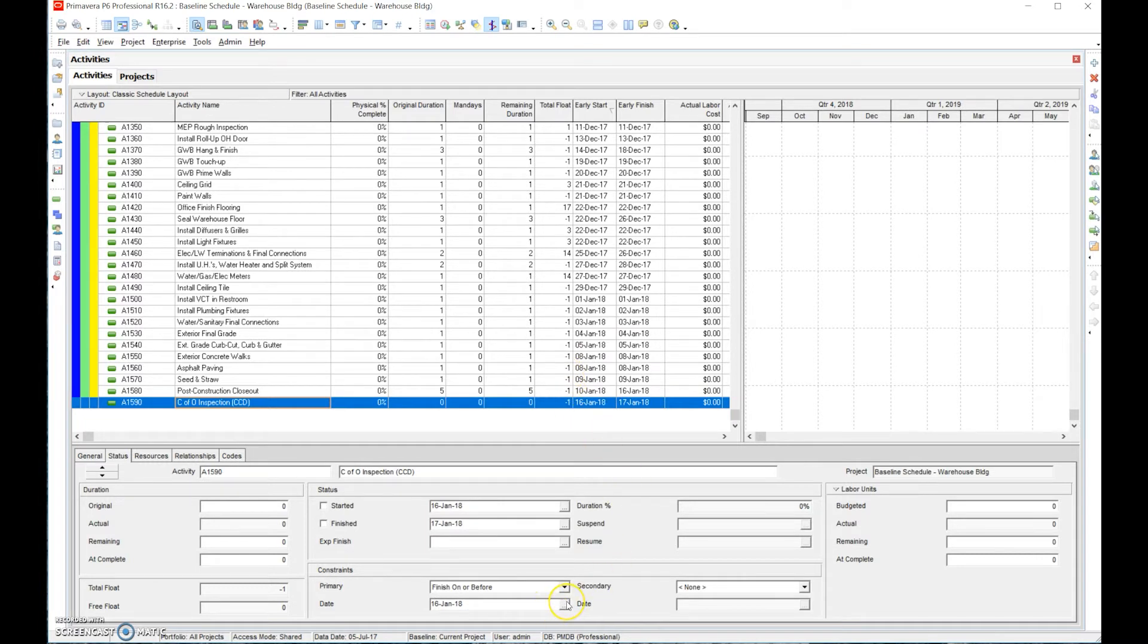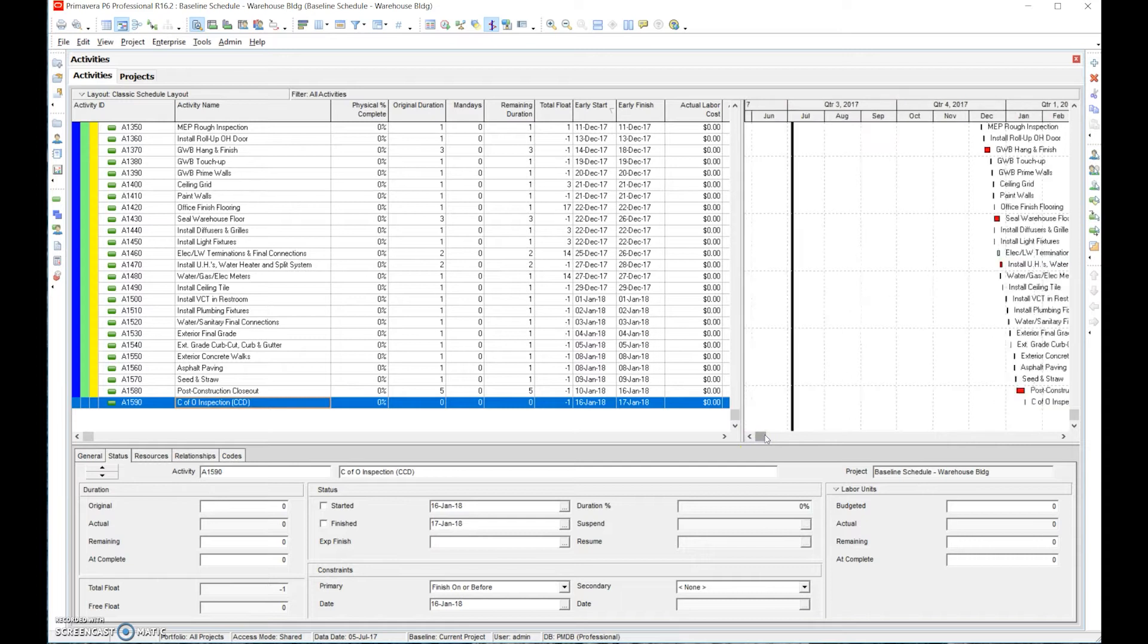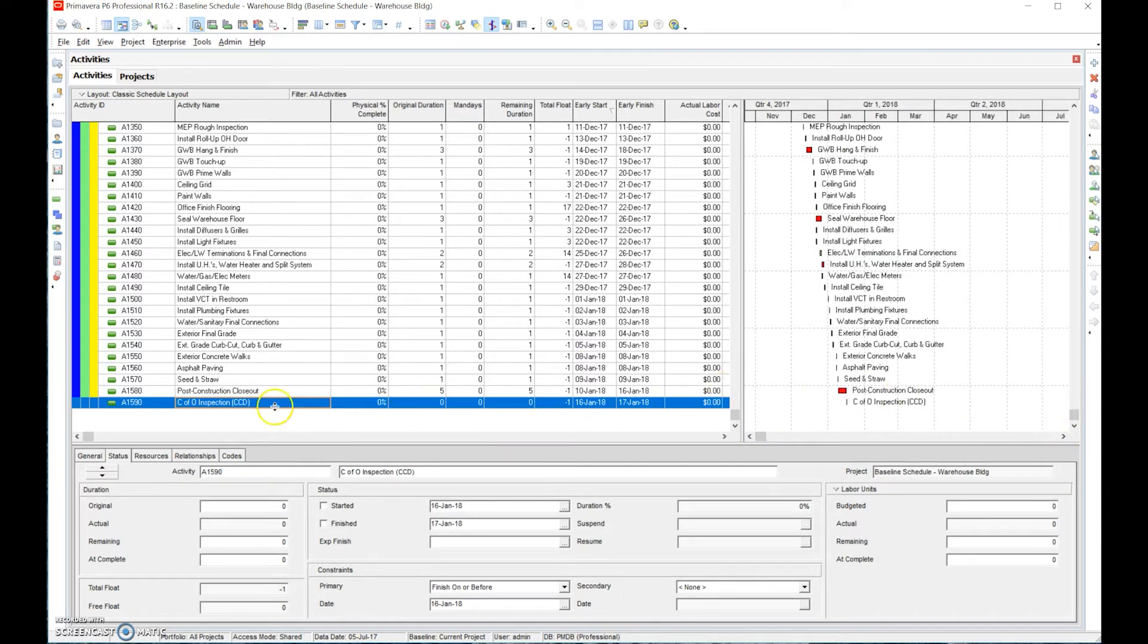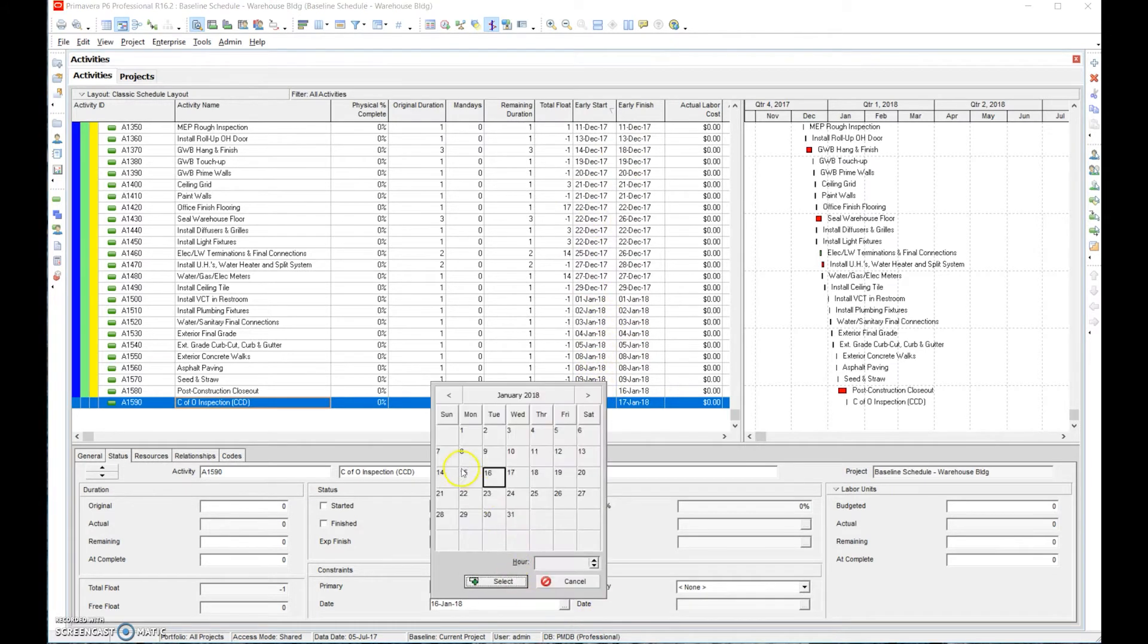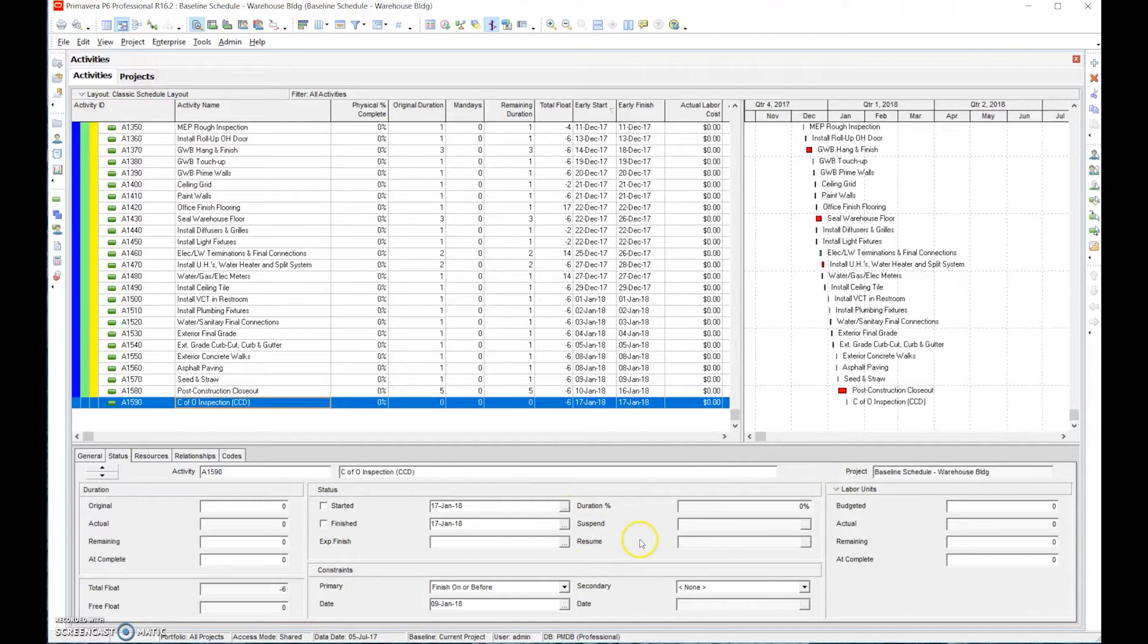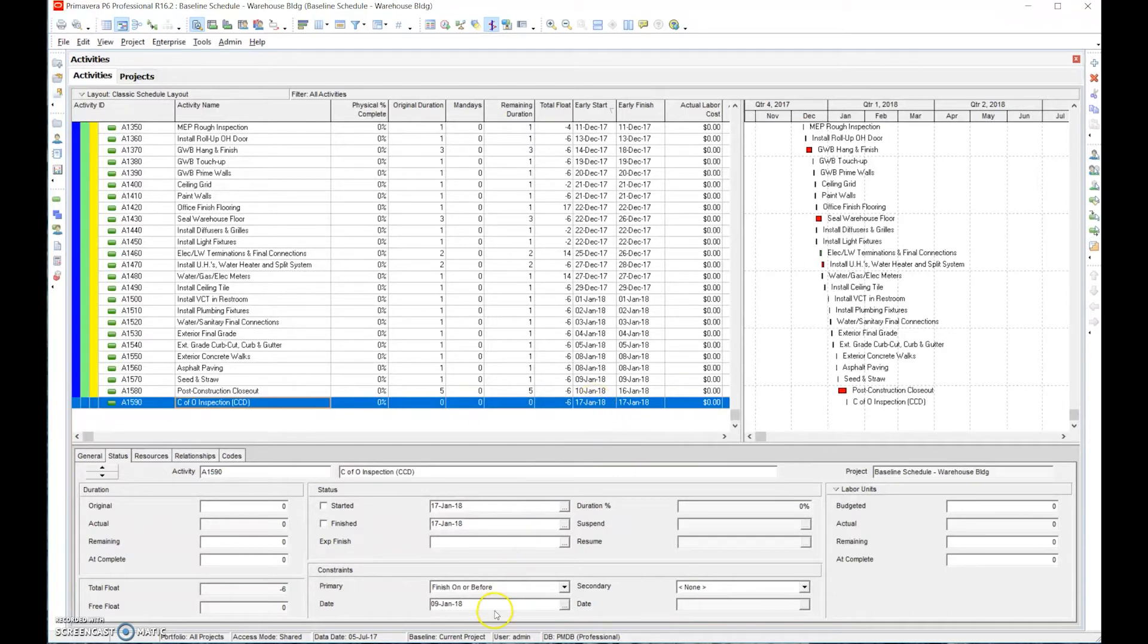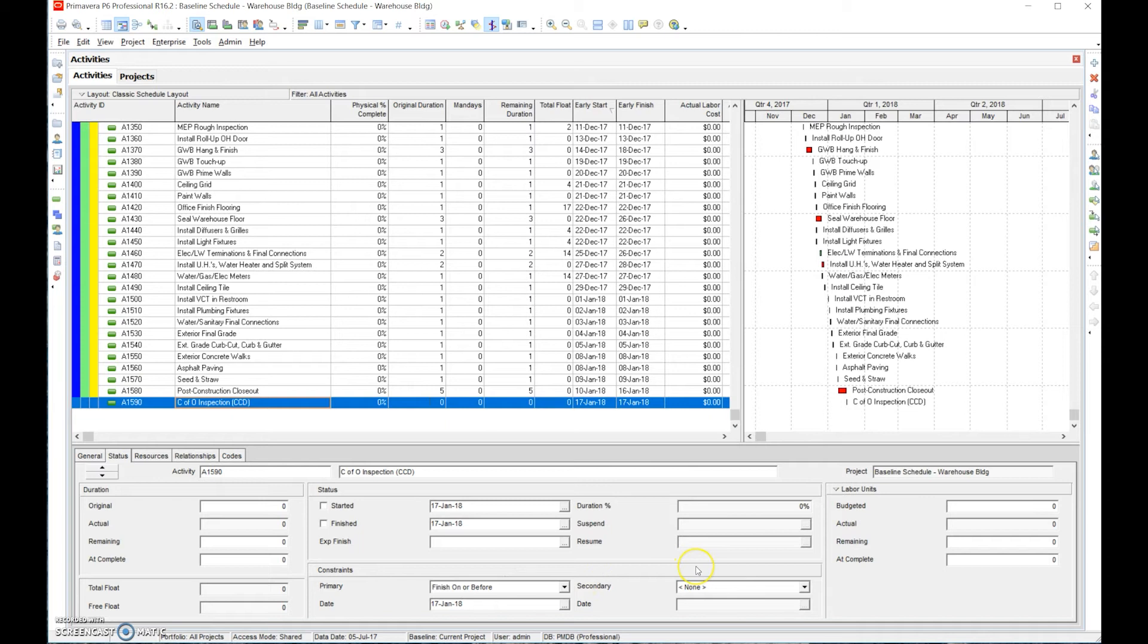So if I'm going to say that everything needs to get done on January 16th, what this says is that the contract completion date is one day beyond when we need to get it finished. If I were to go even further back and say the ninth, it's going to say the 17th is six days. The 17th is six days after January 9th. So for a baseline schedule, we want to make sure that we don't have any negative float at all.